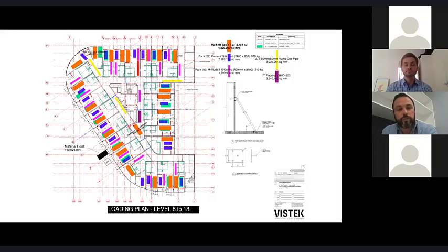But to be able to do that opens up the floor plate significantly. Also looking at potentially leaving corridor doors out. It opens up the possibility of filling those in with lightweight walls and giving you accessibility around the entire structure for materials handling, and being able to focus the critical path purely on structure rather than having to load materials on, which is really challenging.